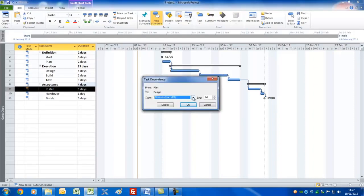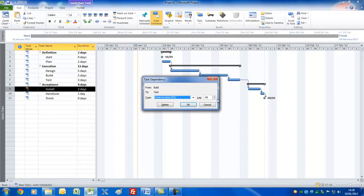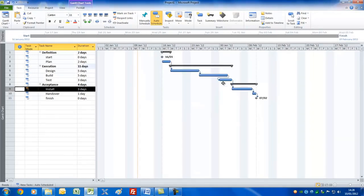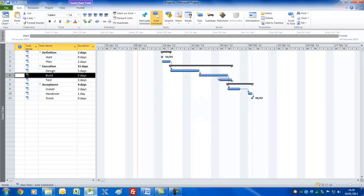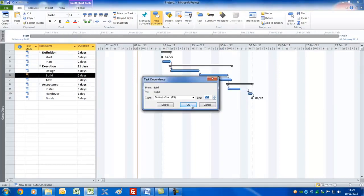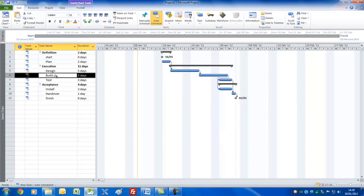You can change links to different relationships. Between Build and Test I'll double-click the link arrow and put in a lead by entering a negative number — you'll see it overlaps by the amount entered. To delete a link, double-click it and press Delete. Then I'll re-link Build and Test with a lag of minus two days so they overlap nicely.